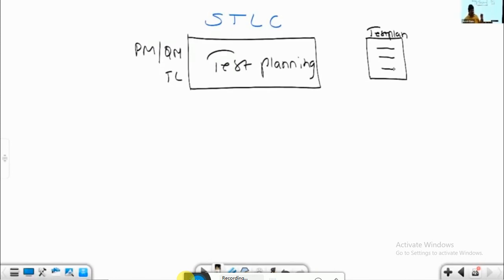Scope of testing, I'll explain this once again. What to do first, what to do next, the test approach. Who are the points of contact? What kind of infrastructure is required for testing in this project environment? By what time should scenarios be finished? By what time should test cases be finished? Work schedules. This plan document will be given to all of the team members.